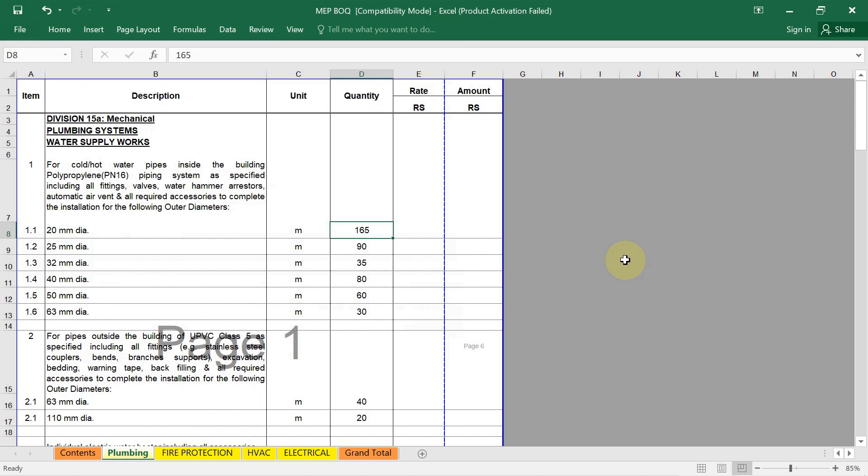Here I will guide you how to prepare a comprehensive BOQ for plumbing work, the same which I have already discussed in the HVAC work also. To prepare the BOQ for plumbing work, you have to follow some steps. In the first step, you have to understand the project scope. For that, you have to review the design documents, study the plumbing drawings, specifications and other relevant documents. Then clearly define the scope of work including the type of plumbing system, water supply, drainage.